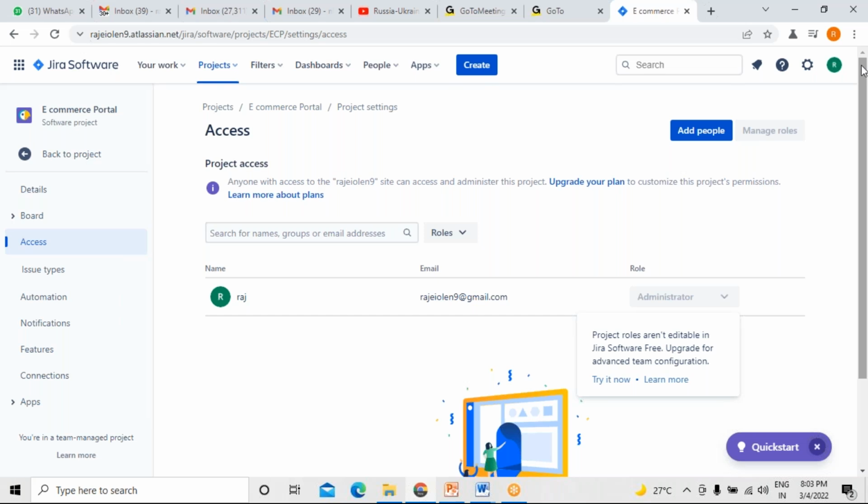For example, in one sprint there may be four user stories, and two are completed, two more have to be done. In the second sprint, two are completed, two balance. How many total user stories were there? Eight. How many completed? Four completed, two from one sprint and two from the second. Assume that we gave two story points to all the user stories.